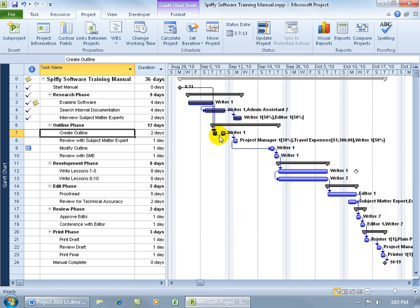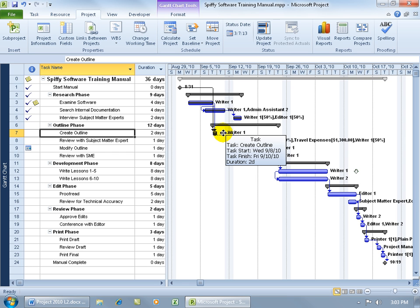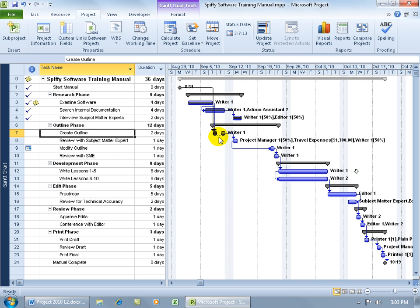We've got a one day of delay here, so when you hover over that part of the task that's been split, you can see that in the pop-up, Friday, September the 10th is when he's coming in to go ahead and complete it. It still has a duration of two days because that's how long it's going to take in man hours, 16 hours to complete the task. It doesn't take into effect the delay here.